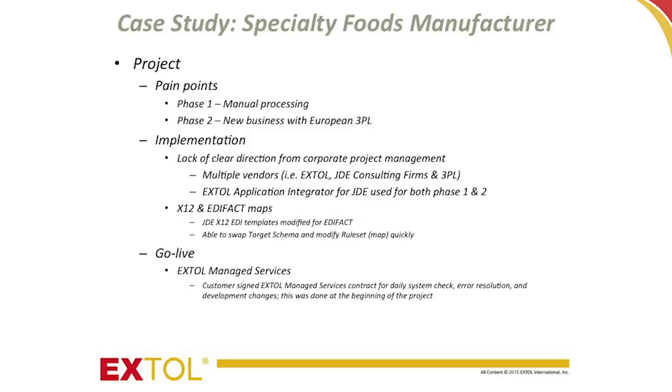As I mentioned before, we had some lack of clear direction from the corporate side on the project management side of things. But once we realized that, and once we made sure that each of these players from the JDE side, from the Xtol side, really need to report to a customer-specific project manager or leader to drive that, the project went much more smoothly, both from the U.S. piece of things and also from the European side of things.